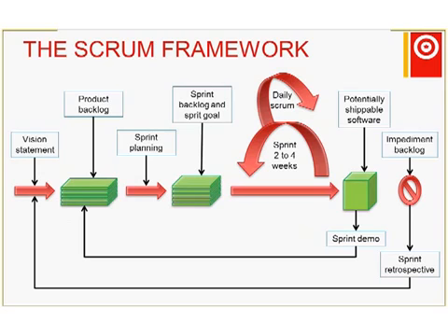If the duration is much less than 2 weeks, then the overhead of creating and managing sprints becomes unreasonable compared to the time available to do the work. If the time goes much beyond 4 weeks, then the sprint gets too big and people start forgetting what they've got to do in the future and forgetting what they've done in the past and how well it worked. 2 to 4 weeks seems to have become a good period for doing the work.